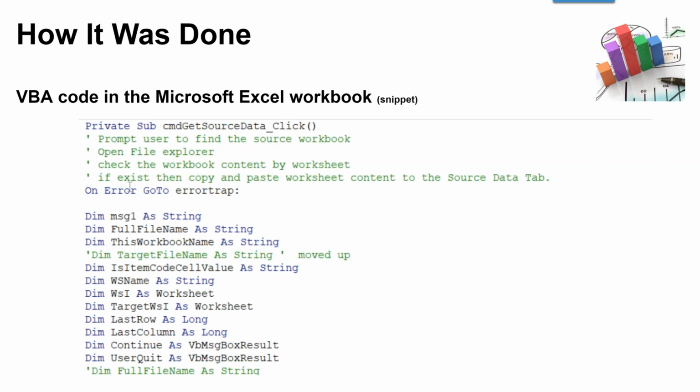So what used to take several hours to compile has now been reduced to minutes. The data integrity throughout the process has been improved dramatically because they're not actually touching the amounts in dollars. The system has already gathered that information and is rolling it through and using the numbers. And computers are pretty good with that. They don't screw up the numbers too often. And so what took several attempts to import the project budget now takes an easy click and go.